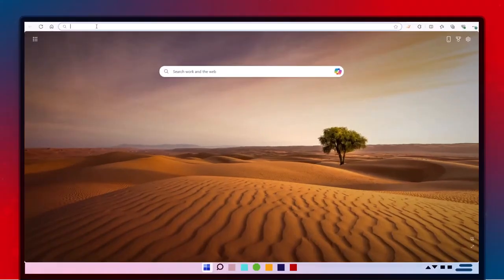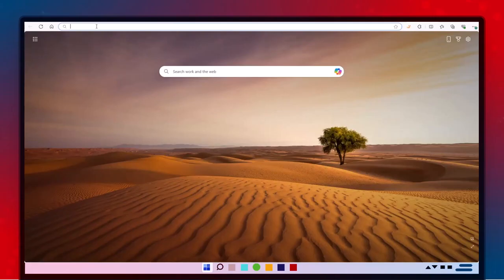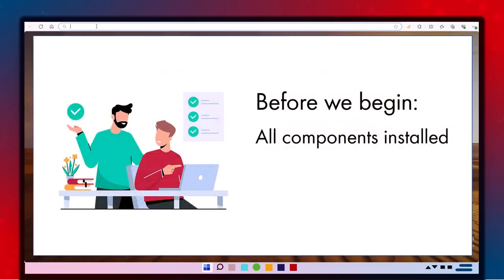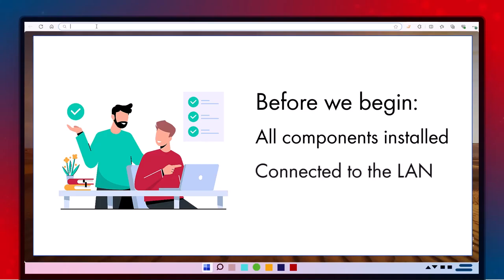Before we start commissioning the SMA system, make sure the EDMM-20, PV inverters, and accessories are fully installed, connected to the local area network, and powered on ready for operation.